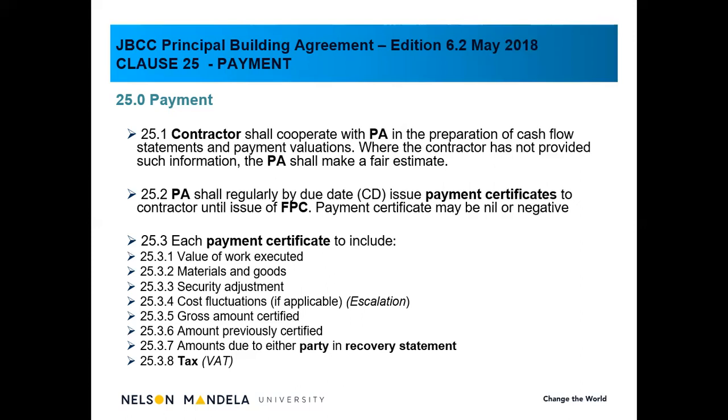You can either use a percentage method. In other words, we can look at the construction up till that point and decide amongst ourselves that masonry is 55% complete. You go back to the office, calculate the value of masonry, times it by 55%. That will give you the value of the work done. It is very risky. It's okay in the initial beginning of the project, but when you get to the latter part of the project, it's a very risky method to use.